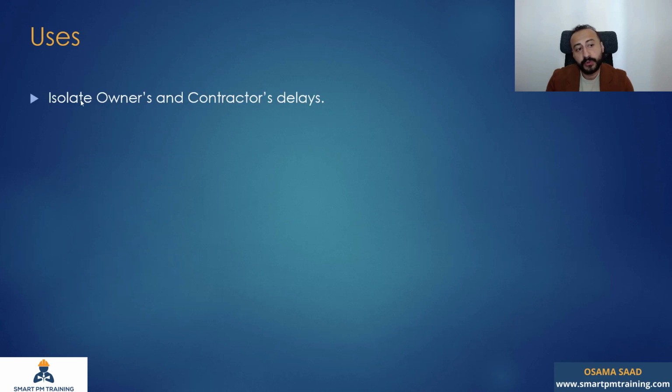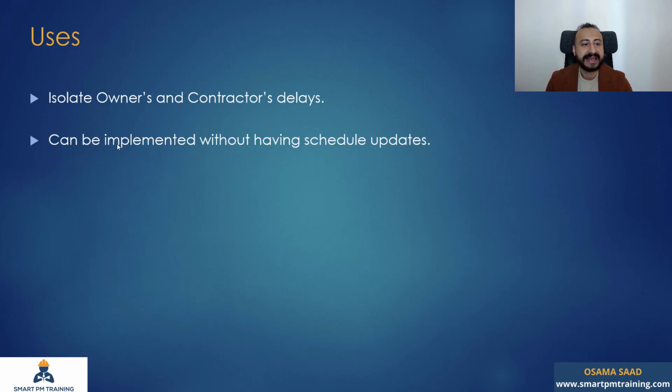Uses: if you want to isolate owners' and contractors' delays, maybe it's a good method. It can be implemented without having schedule updates. You only need the as-built. So it's one of the uses if you don't have schedule updates.